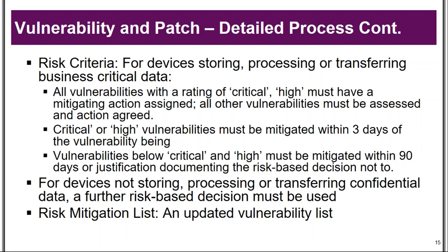And then you want to have a risk mitigation list, and that's going to be an updated vulnerability list that's going to be appended with a mitigating action that you're going to do for that particular vulnerability, a date when you're going to fix it, and who's going to own that action, because somebody needs to be responsible, and somebody needs to report back to me on what has occurred and when it has occurred. Well, hey, you might be the person that's fixing it, but we got to have a plan so that we make sure that these vulnerabilities are taken care of. Make sense?